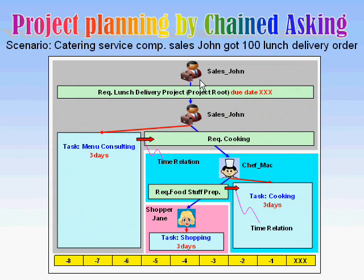Let's imagine a situation where John is a salesman of a catering service company and he got 100 lunch delivery orders. To conduct this job, sales John issued a top request with a due date and created his menu consultation task with three days' duration, then issued a cooking request to Chef Mac and set a time relation from the consulting task to the cooking request.